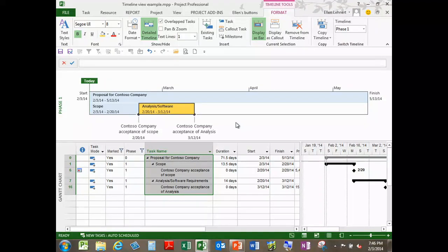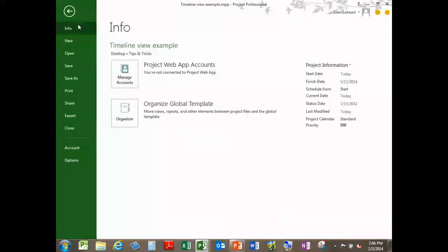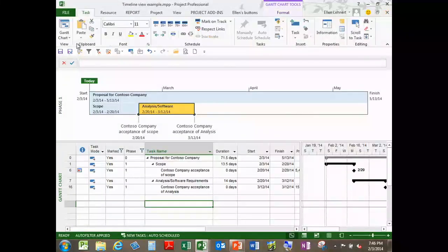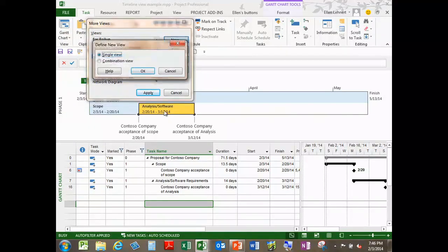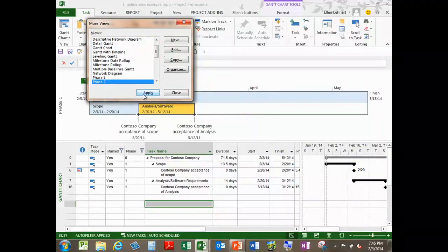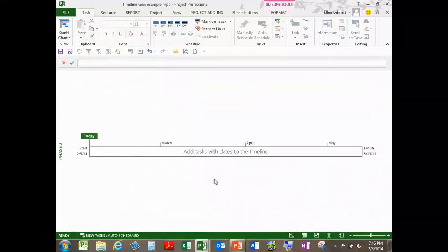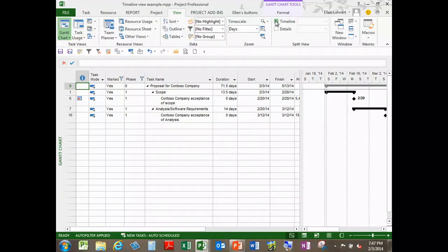But now I want to have one for phase 2 as well. So I will go back over here again, and I'll go to more views, and I'm going to create another new one, and I'll make a single view, and I'm going to call this one phase 2. Again, I'll do the timeline and click OK, and I'm going to apply it. See, that's all I'm seeing, and that's fine. Let's turn that timeline back on. I probably didn't need to apply it.